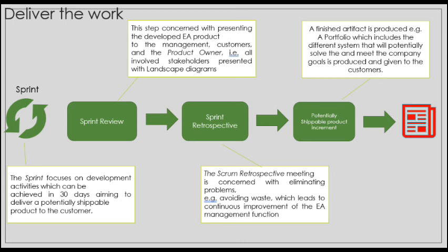But firstly, in the product backlog review, the product owner will decide the EA product that must be done for that sprint. In CSVLOD, for example, this could be in the landscape section where the system roadmap artifacts are delivered after the information is collected from business. In expanding the backlog tasks, the Scrum team will break down the sprint goal and estimate the effort required for each artifact, e.g., in landscape, the landscape diagrams applicable might take 2 days, 3 days each.